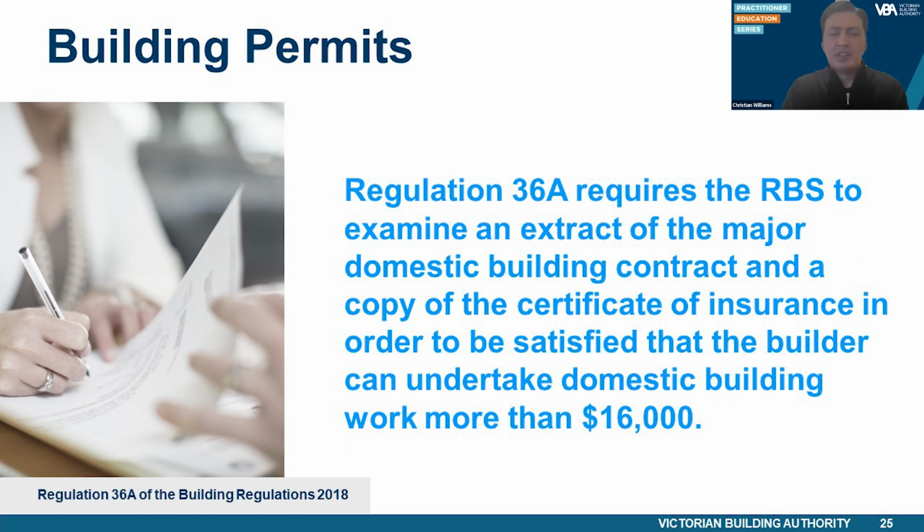The most appropriate practitioners to carry out this type of work are commercial builders that are registered in a class that's applicable to the work. However, this does not mean that the permit cannot be issued to other practitioners as the builder. The VBA recommend that building surveyors err on the side of caution if considering to issue building permits to builders with other registrations. As if something goes wrong, the building surveyor could be held accountable under the Building Surveyor's Code of Conduct.